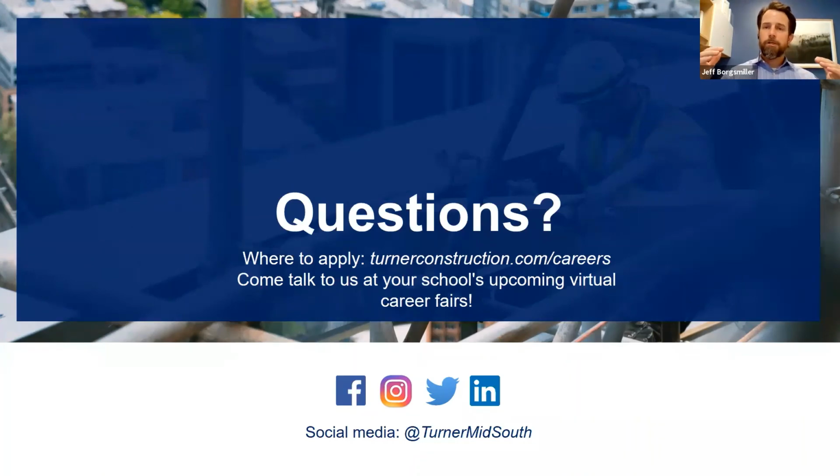And so what we typically get involved in is we'll do a first cost analysis, which tells them which system is cheapest on day one, but we'll also run some analysis on what their utility bills will be with that system over the life cycle of that building, so that they can determine the time period for payoff on a more expensive mechanical system through cheaper utility bills in managing that building. And that's very, very beneficial to clients who will be owning that building for 20, 30, 40, 50 years. So yes, we do that during the pre-construction phase, and we do it on lean projects as well. We do it on all of our projects.